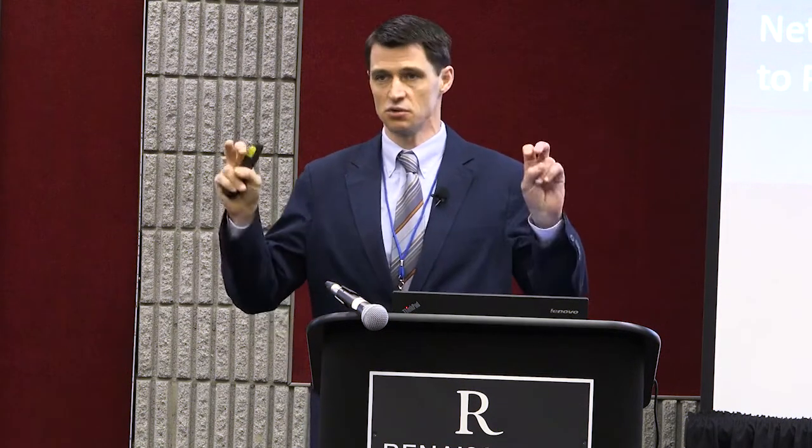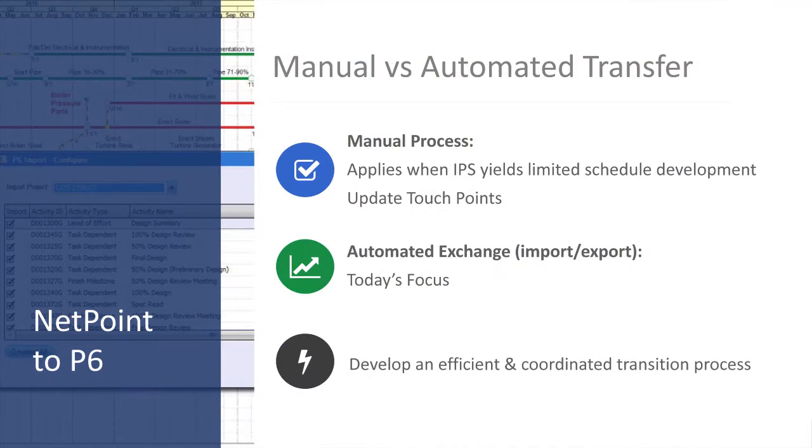It was more about thinking out the process, thinking about the interdependencies. And it was all valuable time. It's just we didn't get a lot of scheduled content out of the effort. And that's okay. We made a lot of progress. For small instances like that, we would just go into P6, add the activities, and call it a day. But when those IPS sessions really develop some volume, 30, 40, 50, 60 activities, no one wants to be recreating that information. So that's our focus for the next few minutes here.